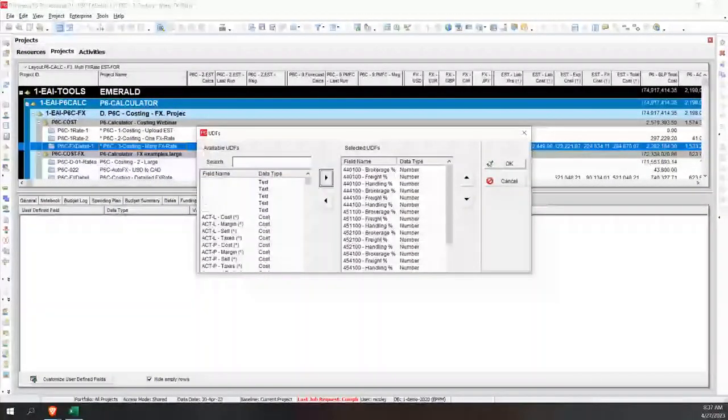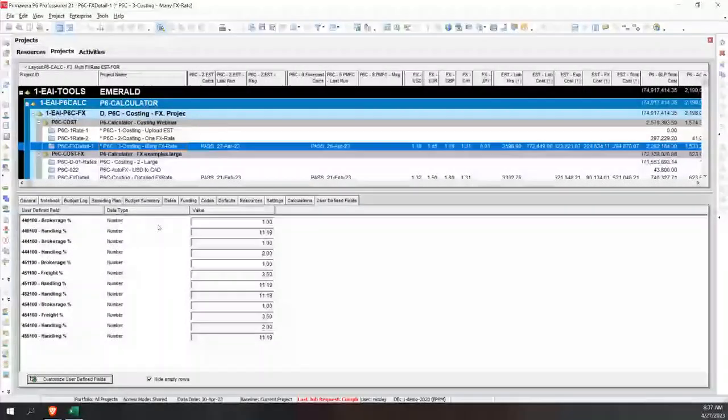Okay, so we added a dictionary of, not exchange rates, but a percentage of the cost that they estimate these different types of things can cost. Okay, so brokerage, handling, and freight. And they vary in this example by the kind of things. So small items get a certain percentage, larger items could get a larger percentage. So that's why you see this fluctuation.